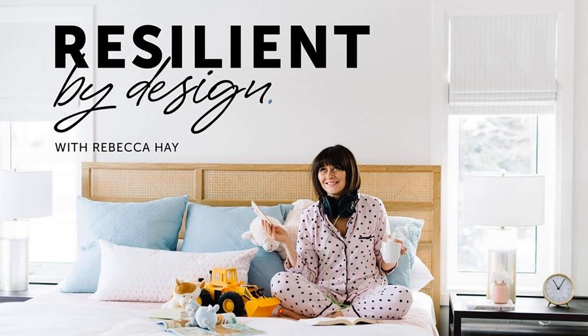No. When you have an actual drawing package with your floor plans, your elevations, your lighting plan, whatever is required by the scope, and even if it's decorating, it's having furniture layouts, you pick the furniture, you pick the swatches, you've got the fabric selected, you've placed CFAs on all of your fabric, like everything is designed.